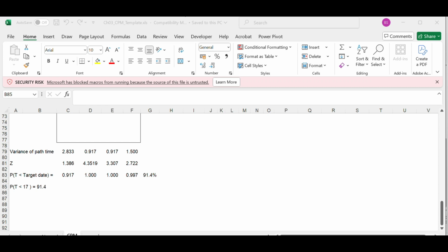Next one is ballpark estimate. After pre-initiation, this kind of estimation can be used. Its accuracy is plus or minus 30 percent, still low. It's the next set of decisions after the first decision gate, that is the pre-initiation phase. We use the parametric estimation method in this ballpark estimation. We can use multiple variables. It is another aggregate estimation method, with the level of aggregation coming down. In this method, the level of disaggregation comes up compared to the order of magnitude method.